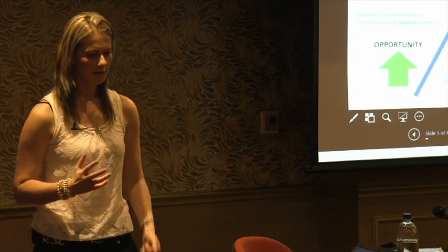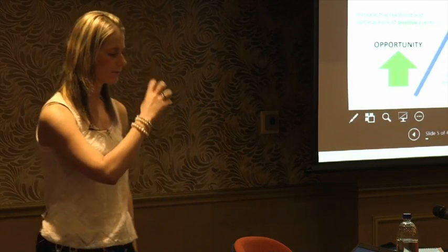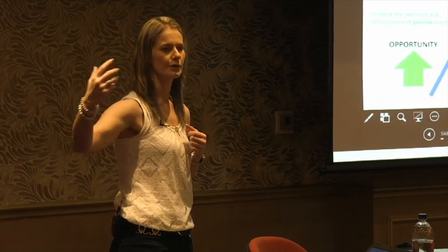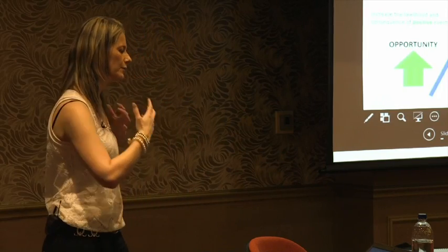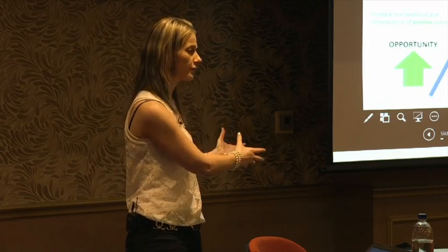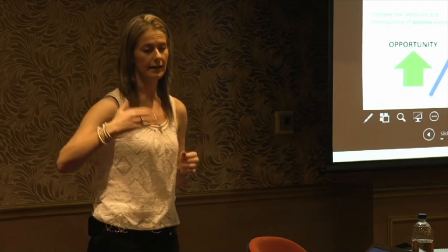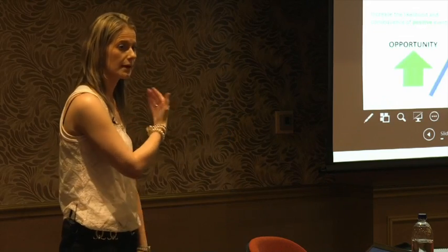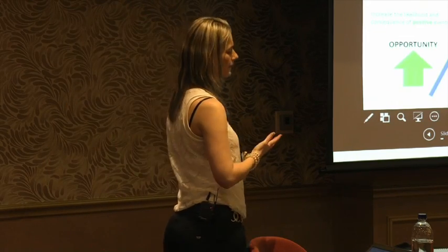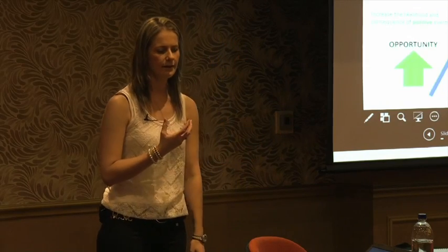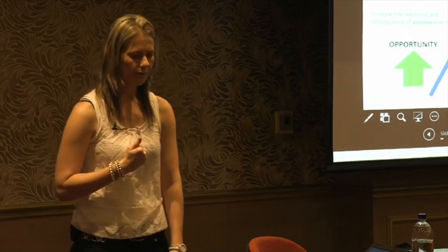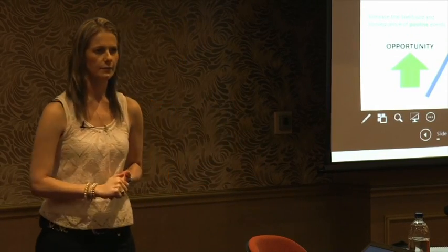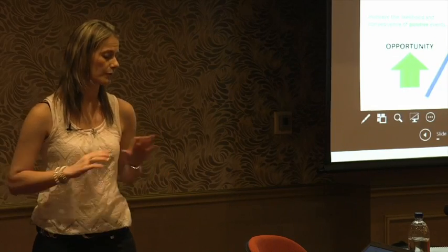But then on the other side again, there's a lot of threats that we need to establish what's the likelihood of that happening, and then what would the consequence be. Now the consequence can be quite a few things. It can have a financial impact. It can have a delay in schedule on the project, which will in turn probably also mean financial impact, because time is money, with downtime, standing time, whatever we assess on site. And then as well, a consequence could be we could have an injury or a fatality on site if we lean more towards a safety point of view from a project point of view.